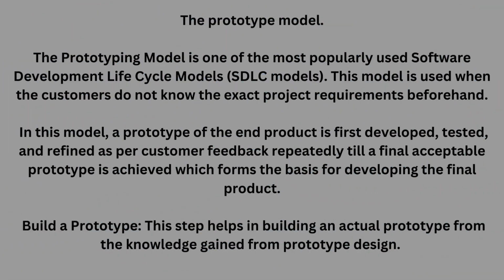The prototype model. The prototyping model is one of the most popularly used software development lifecycle models, SDLC models. This model is used when the customers do not know the exact project requirements beforehand. In this model, a prototype of the end product is first developed, tested, and refined as per customer feedback repeatedly till a final acceptable prototype is achieved, which forms the basis for developing the final product.